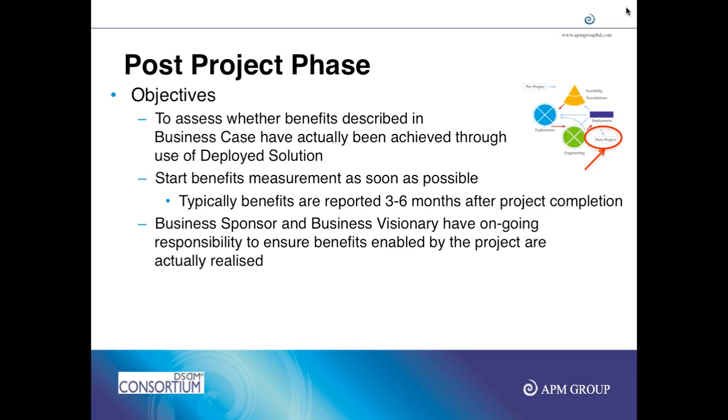If you remember, during deployment planning we created a benefits realization plan. As part of the benefits realization plan, we use it and check what benefits we have got. Typically, 3 to 6 months is what people use in software applications and implementations to see how it has worked. We did a couple of benefits realization reviews.